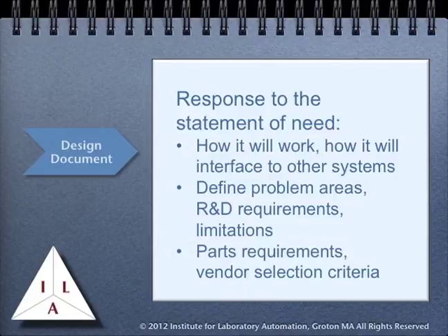The design document is a response to the statement of need. It describes how the system is being planned, how it will work, and how it will interface to any other systems. It should also define problem areas, areas where work needs to be done to determine feasibility or overcome potential difficulties. These are places where additional research and development may have to be done and could pose risk to the project.